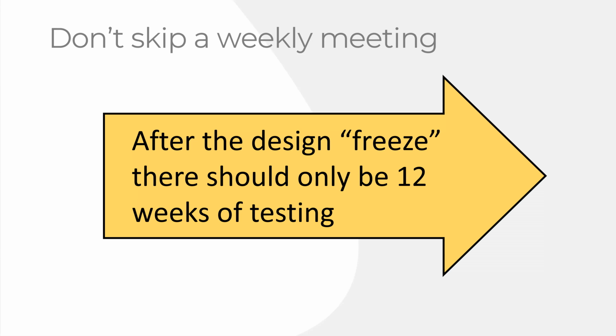So it's 20 sections to a 510K. Section 13 is labeling. Sections 14 through 20 are testing. But the boilerplate stuff that comes in the beginning of a 510K submission, those 12 sections, we should be completing one a week at least. And you should be having weekly meetings with us, and do not skip them. Otherwise, your 510K project will be delayed.